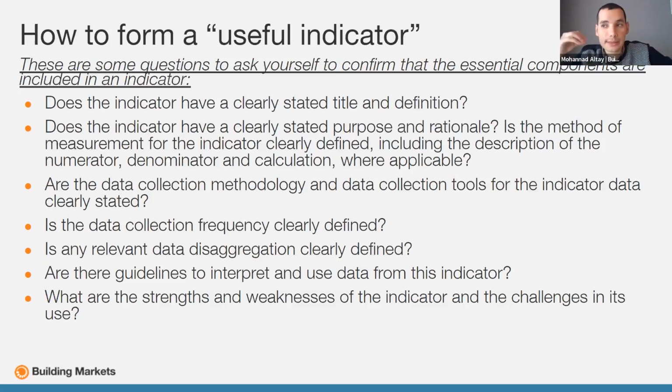So it is crucial to make this risk assessment. Not only per service, not only per location, but it is important to do the risk assessment per indicator, to know what you are expecting. Of course, the risk assessment is related to the community you are dealing with, to the geography, and also to the kind of data collection tools.